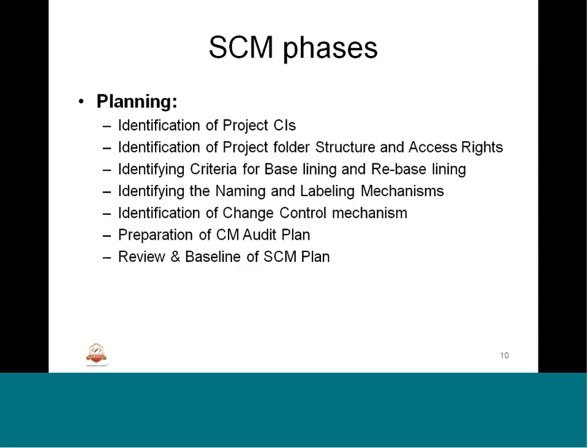Identifying the criteria for baselining and re-baselining, identifying the naming and labeling mechanisms and the conventions that are followed, and identification of the change control mechanism, how it is going to be changed, and preparation of the CM audit plan. As I said, configuration items have to be audited for status accounting, and the plan for that, including frequency or duration, all this will be part of the planning. Then it is also important to review and baseline the SCM planning.